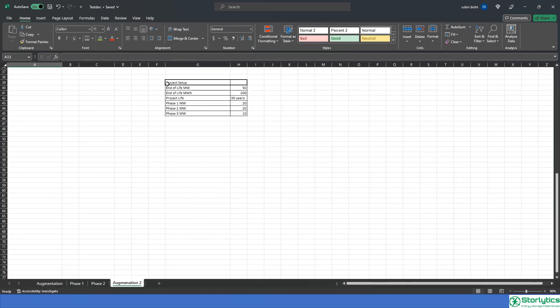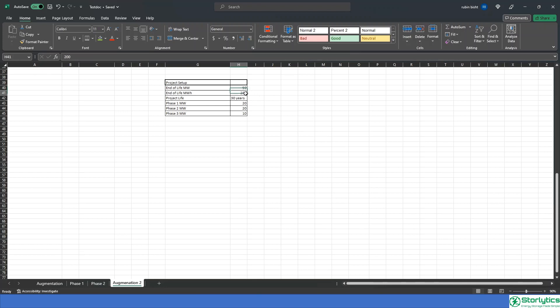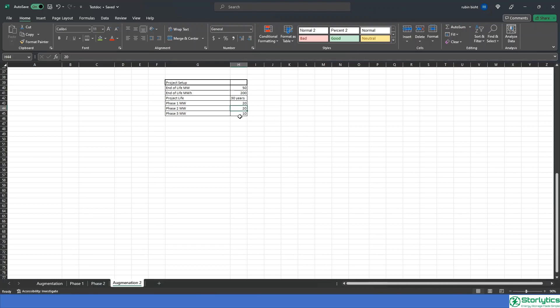The profile generation assumes the battery of 50 megawatts and usable energy of 200 megawatt hours. This is to be considered as end of life capacity. The idea of augmentation is to build up the needed end of life capacity with AC augmentation.